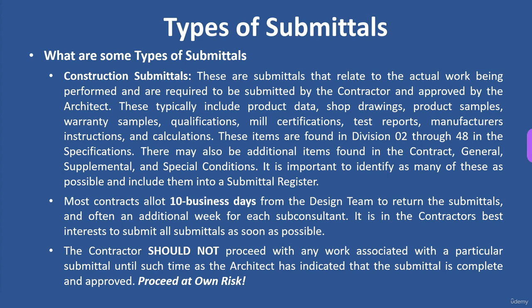Obviously, if you're worried about painting or carpet, it's at the end of the job. Focus on your front end stuff. Everybody kind of gets it. But that's why you have a submittal schedule, to tell us when we should be getting everything.